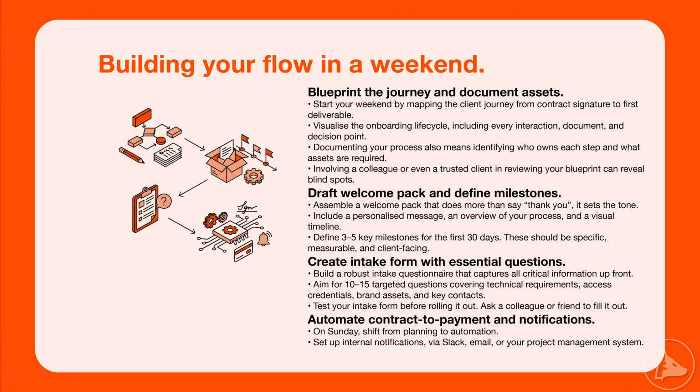Saturday evening, build the intake form. Keep it targeted, 10 to 15 questions. Cover goals and success criteria, access requirements, assets needed, stakeholders and decision maker, constraints and deadlines. Then test it. Get someone to fill it out and tell you what's unclear. Small tweaks, like reordering questions or improving instructions, can massively improve completion rate and the quality of answers you get.